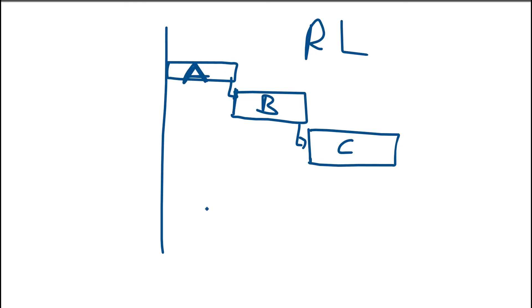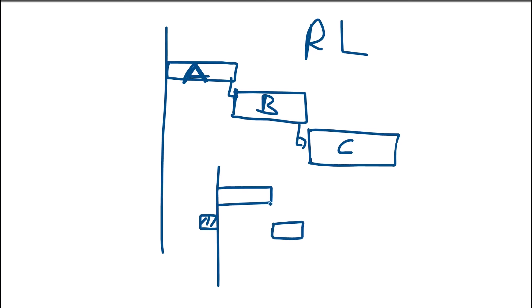Now let's consider a scenario whereby activity A has not started, but B has started. What will happen when you update your program is that the part of B that has started will be on the left-hand side of the data date, whereas the remaining part of B — let's call it B2 — will still respect the logic between itself and A. Then C will still follow activity B2. So it's retaining the logic: even though B has started, the logic between A and B will still be respected.